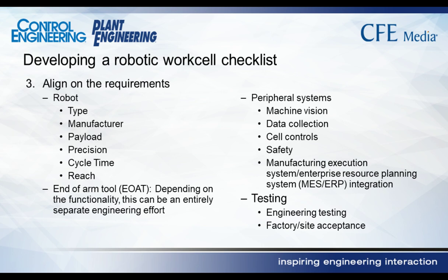And then testing. Critical to define testing requirements for a work cell so that the company that's helping you with that work cell, or even your internal team that's helping to put this work cell together, really has a solid understanding of what success looks like, and then factory and site acceptance testing being defined as when the cell is built, what does it need to meet the requirements in order for the plant to accept this work cell.